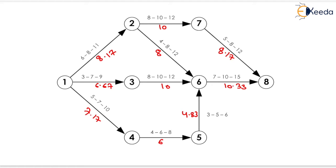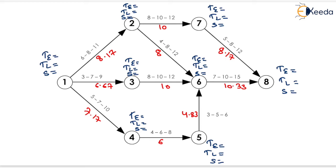Now we will calculate the TE, TL, and slack for each event. For event 1 the TE will be equals to 0. For event 2 it will be equals to 0 plus 8.17, so it will be equals to 8.17. Similarly for event 3 it will be equals to 0 plus 6.67, so it will be equals to 6.67. Similarly for event 4 it will be equals to 0 plus 7.17, so it will be equals to 7.17.